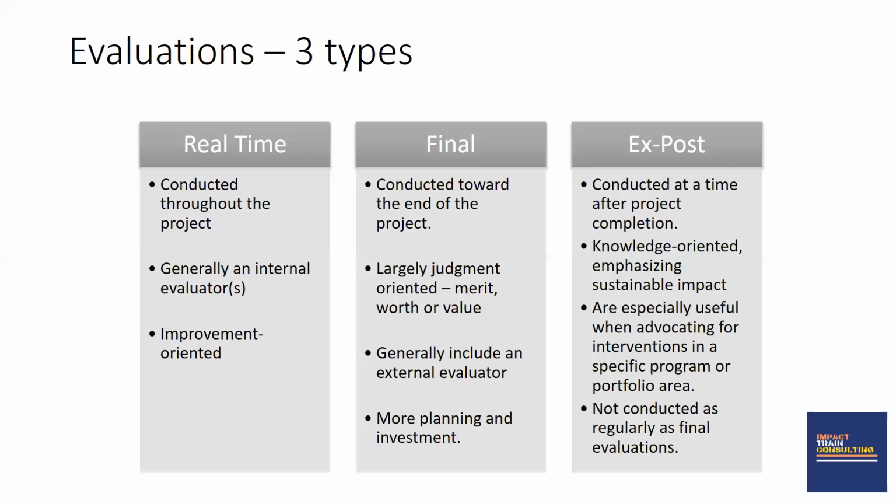The final evaluation is conducted at the end of the project. And the purpose of this evaluation is for judgment. You're largely passing judgment on the value of that project. You're trying to prove the merit or the value of the project based on the amount of resources that have been spent on that project. We want to see if the change we are seeing compared to how much we've spent is worth it.